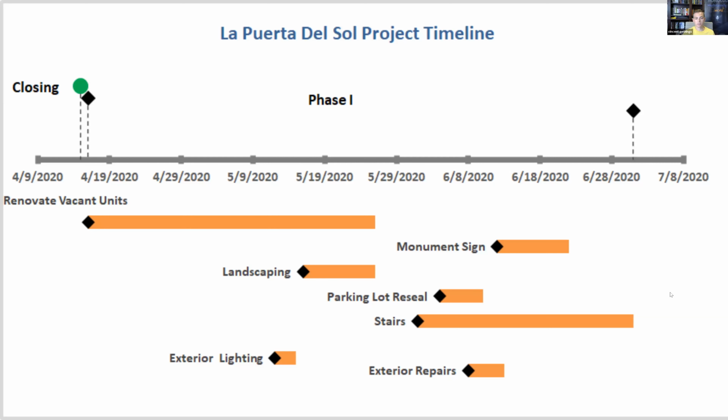Let's get them cleaned up, painted, and market ready, because I got this person that's waiting to move in at market rate right now. So that's what's been happening, is that the leasing is going so well that we're pushing the heavy renovations down the line a little bit to take advantage of how hot the market is right now. So it's a good problem to have. And they'll be done in about the end of this month anyway, the rest of the vacant units.